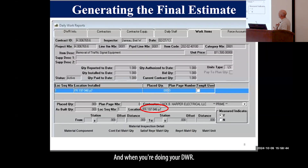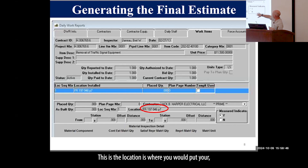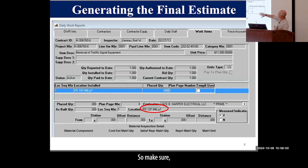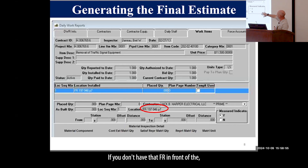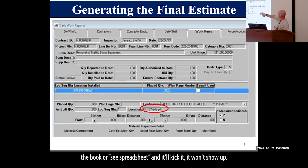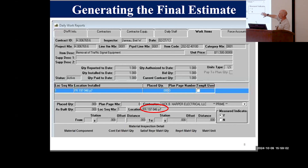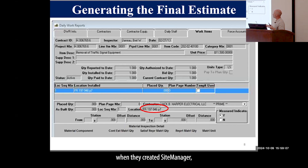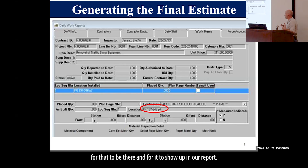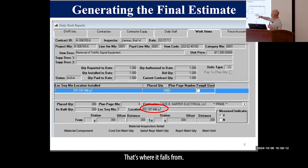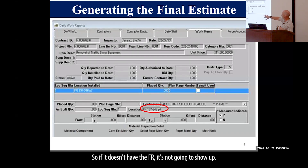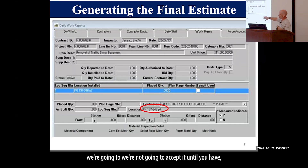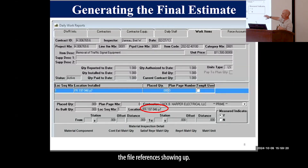When you're doing your DWR, the location field is where you put your final reference. Make sure you have 'FR' in front of the book or 'see spreadsheet.' Site Manager is a really old program coded really weird — if you don't have that FR in front of it, it won't show up. You have to put that FR in front of it. If it doesn't have the FR, it's not going to show up, and we're not going to accept it until the final reference is showing up correctly.